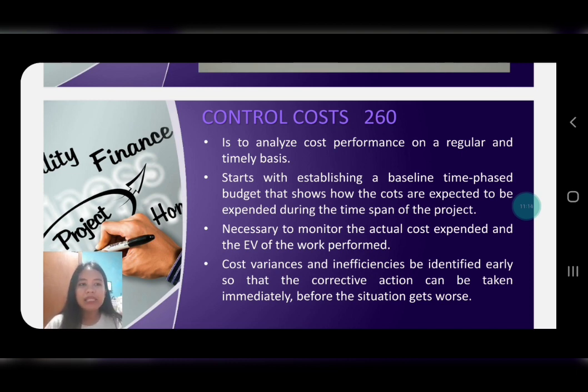It's really the baseline of a time-based budget that shows how the costs are expected to be expended during the time span of the project.